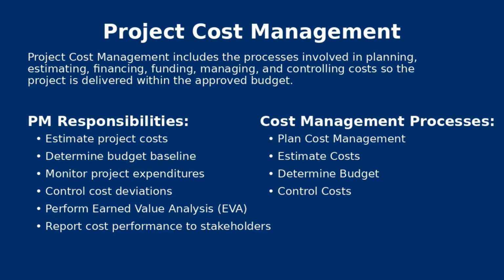This requires detailed planning. You will be able to easily get buy-in from the team, as these estimates are more accurate and more refined. When your boss comes and says you do an estimate, the question that you need to ask is, what should be the range? Does it need to be a high-level estimate or bottom-up estimate? What should be the range? It has to be plus or minus 15%, plus or minus 10%, or 25%, 78%.